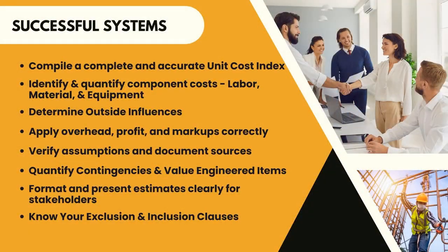A lot of times they won't allow exclusions or inclusions because it ends up being too much overlap that has to be managed. And the general contractor then becomes at risk of being responsible for all of the little things that subcontractors have removed from their particular scope of work.